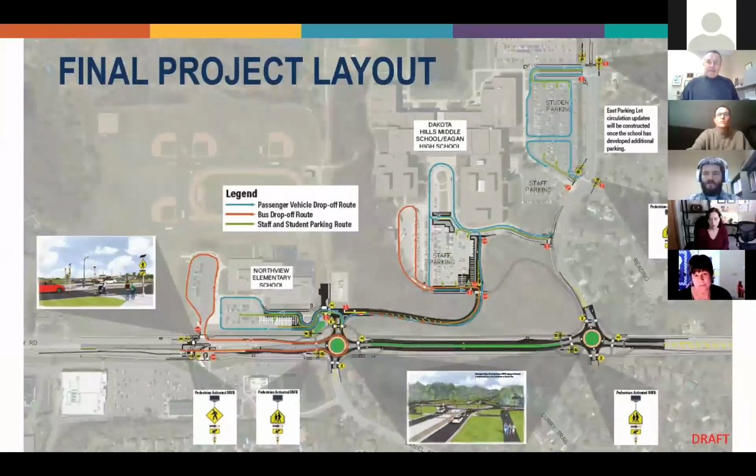Now that I was reminded of some of the work that we did with the other agencies in Wisconsin, there were a couple of other items that we implemented from a lessons learned standpoint. One of those was the width of the crosswalks at the schools, as well as the width of the median. I mentioned earlier having a wider than normal median so that we can accommodate multiple bicyclists and groups of kids, a dozen kids that might cross together, and we don't strand them out in the median without enough space.